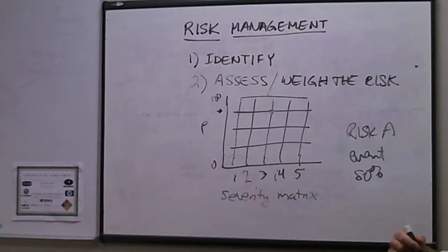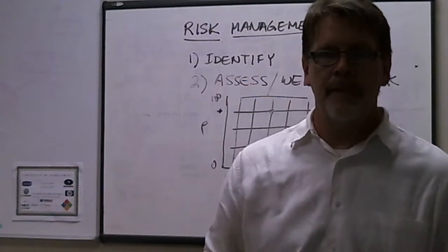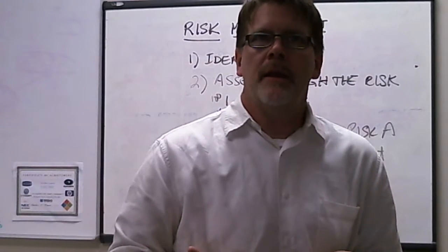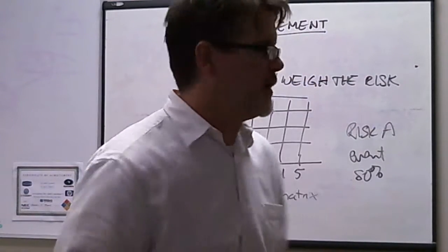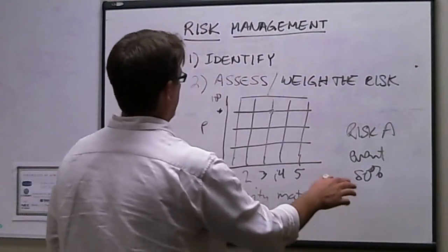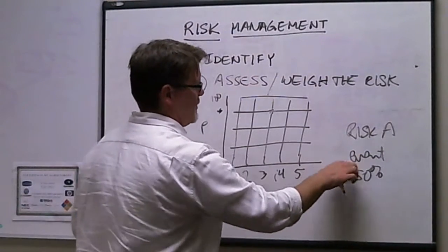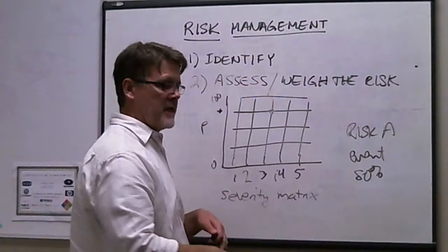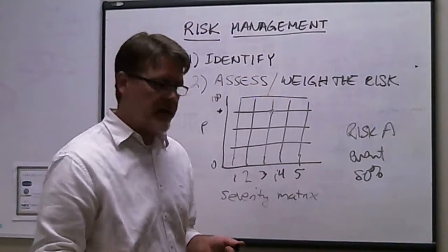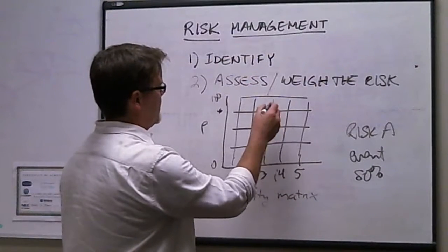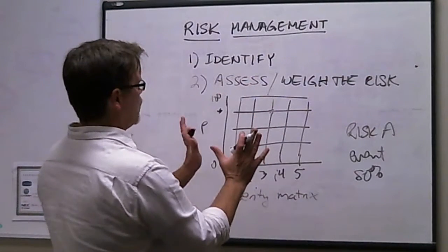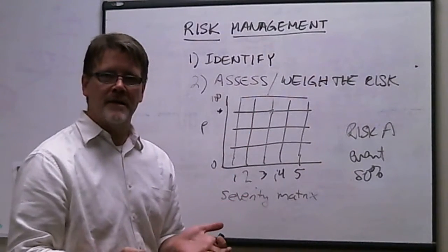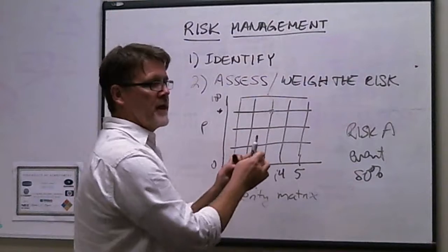And what you'll need to decide as a team is what it means in terms of relative severity. So if you've got a risk event of 80% chance of occurring, and the severity matrix that you've all decided on has an impact of 3, and you've identified it in this particular location, when you look at that area of your matrix, what is that area going to tell you?